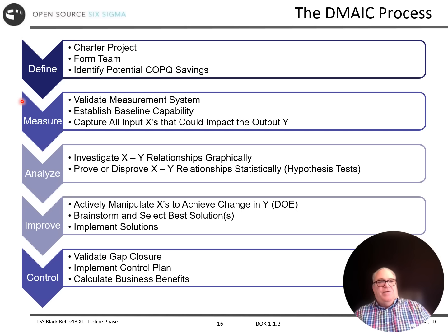So when we look at what we are trying to do within each of the 20% milestones here in Define, it's all about, hey, what project are we going to do? What does it look like? Let's write it down in some way. We need some resources, so we're going to form a team, and then we're going to test it with an initial guess at what would the value be to the customer and to the business. So if we're going to put some effort into it, what does the return on that effort look like? And hey, then we're 20% done.